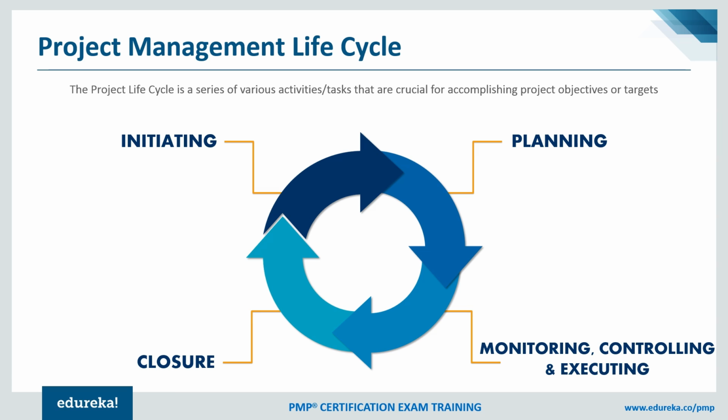The activities in the initiating stage are activities such as finding out the business case, that means the business reason why we are into this project, working with sponsors to get the charter document created, finding out what the customer's requirements are, and finding out who the stakeholders are. These are a few of the activities done in initiating.